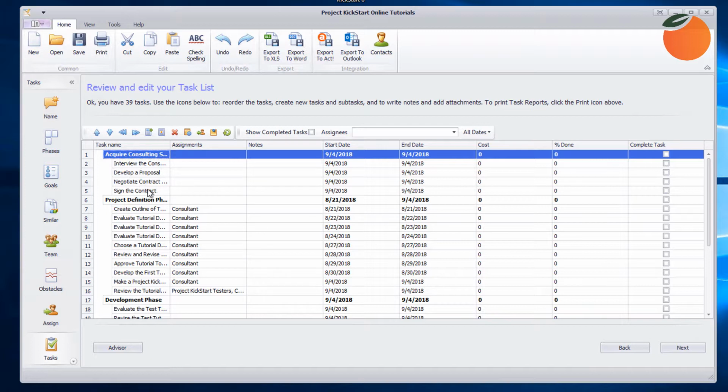Now, here's a planning tip. It could be tempting to continue to break tasks into subtasks and subtasks down into subtasks, but this is not necessarily a good planning practice because project plans really work as guidelines, not as micromanagement tools. As a rule of thumb, 95% of planned tasks should be between 1 day and 3 weeks in duration. If a task is shorter than a day, it's usually an event or a milestone. Now, if a task requires more than 3 weeks, it's really a good candidate to be a phase or to become a task with subtasks.